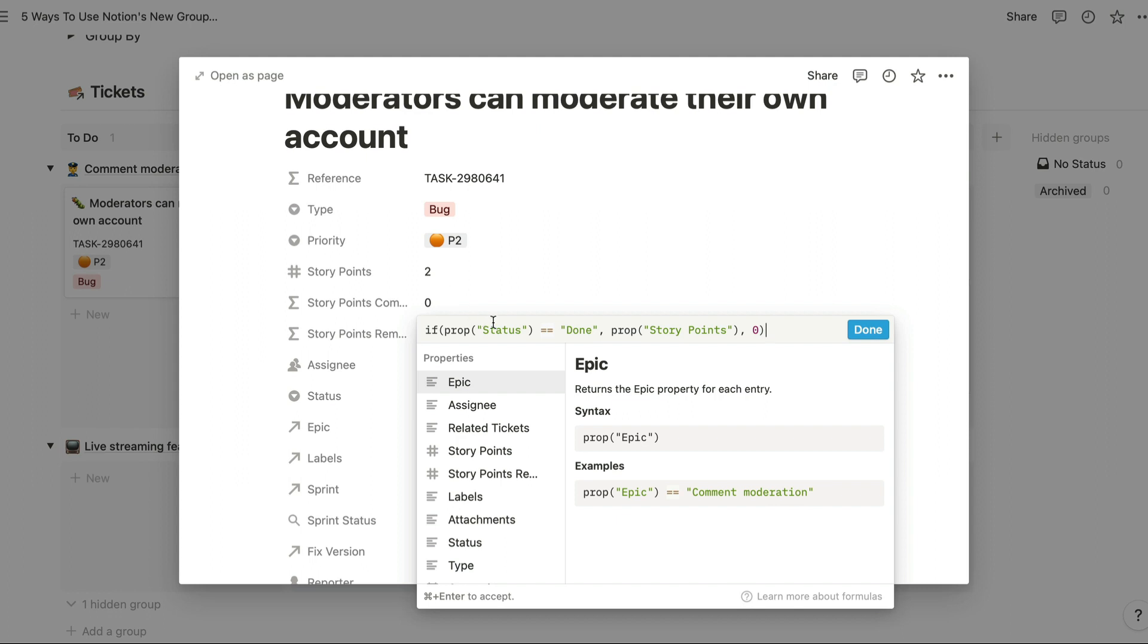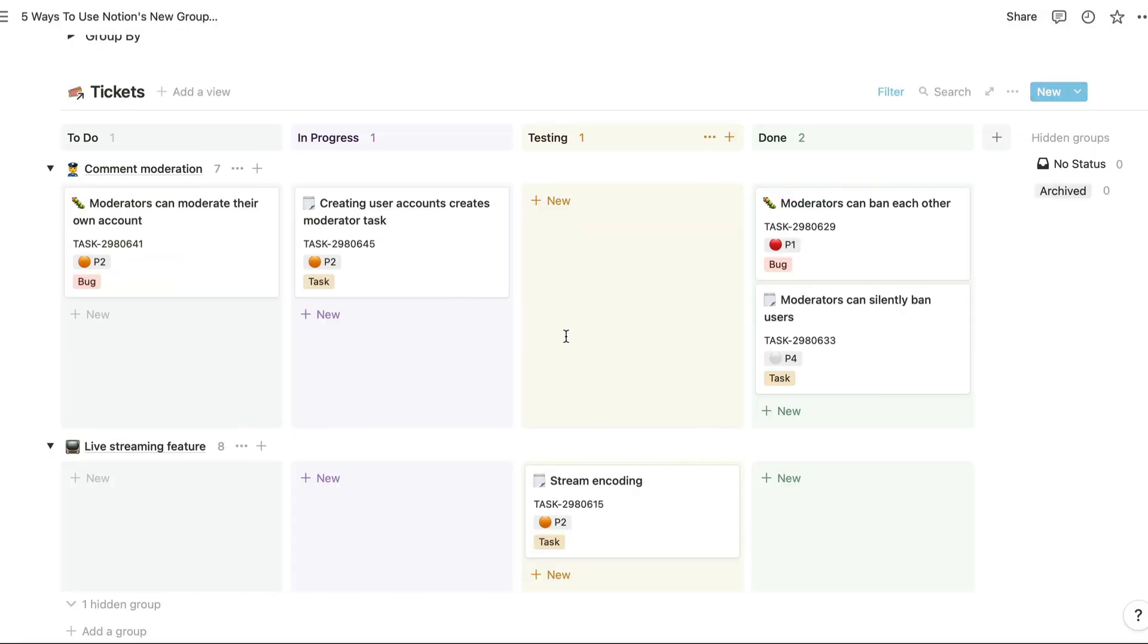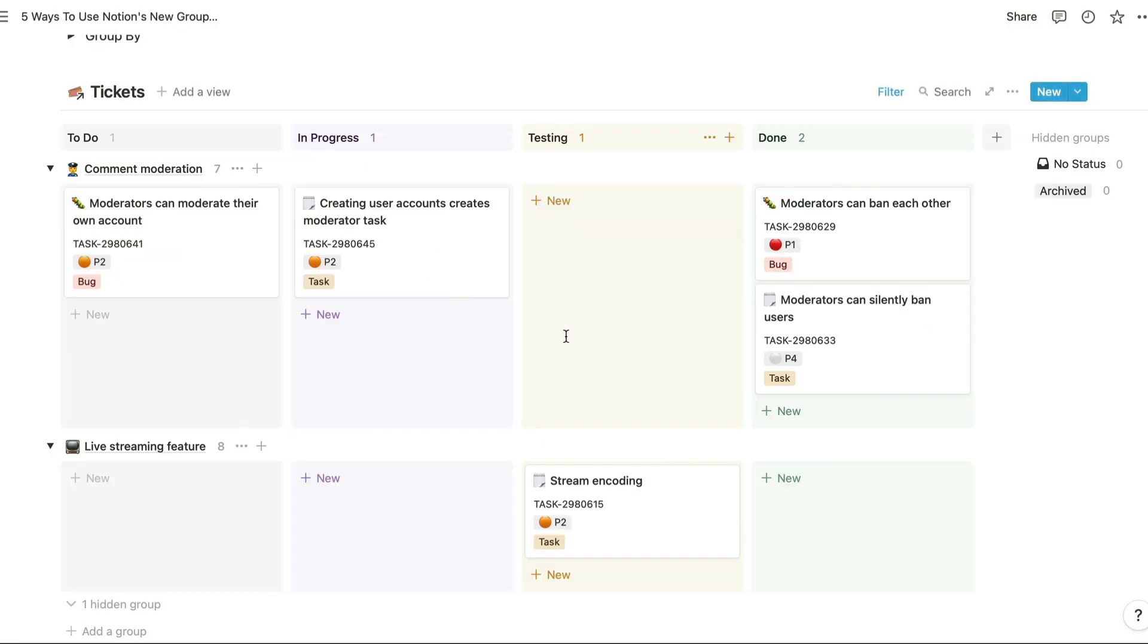We're checking whether or not the status has been set to done, and if it isn't, then we'll show the number of story points. If it is marked as done, then we'll show zero, and obviously that updates the calculation. This gives us a sense of how much work is left to do in order to finish the feature.